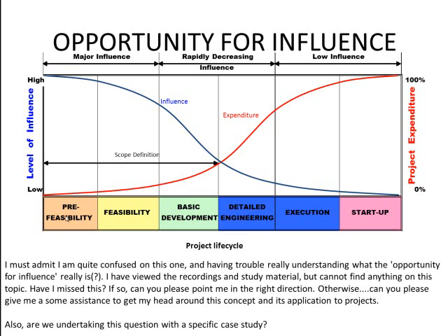So during the pre-feasibility stage, we maybe do a few plans and do financial stuff. Then we go to the feasibility stage and we do some more planning, and we might even do a few models and do a few prototypes. But when we start going towards basic development, this is now where we start doing detailed planning and execution plans and project execution plans and all of that stuff. It becomes really difficult for us to change the outcome of the project. We can still change it, as you can see on this line, but the associated cost of change becomes prohibitive. Alright, so the more changes we want to do later on in a project, the more it's going to cost